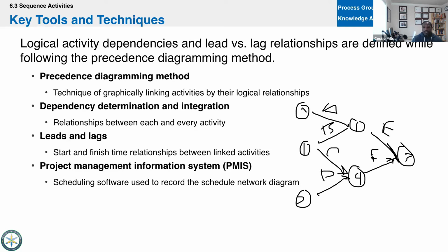And so in this case, the activity is on the arrow. You see here that the activity is on the arrow. It only allows for a finish to start relationship. Regardless of where you're at in the circle, you're starting, and regardless of where you're at, you're finishing the activity. It only allows you for one relationship, and that is a finish to start relationship. That's no longer used, but I want you to see what it's like so that when it's referenced on the exam, you know, no, that's not what we're talking about. So we don't do what they call AOA or activity on arrow. That's no longer used, right?